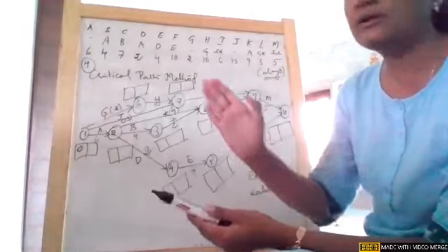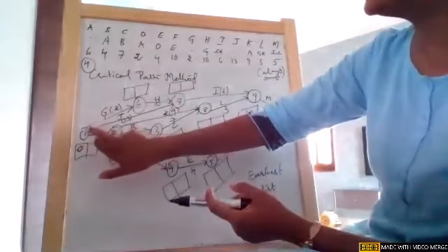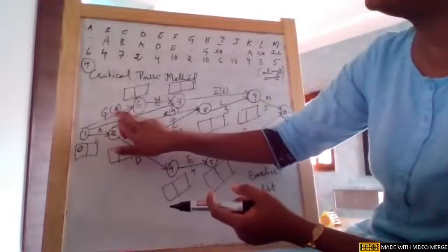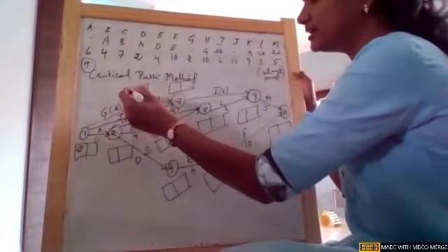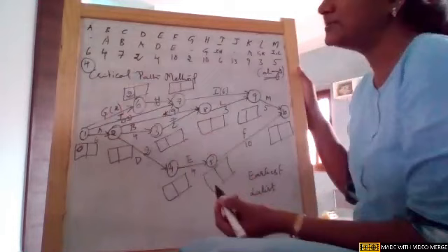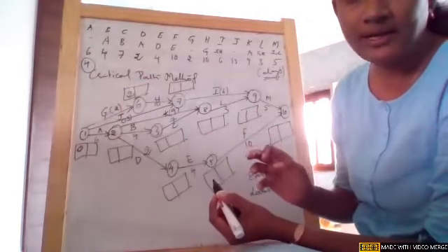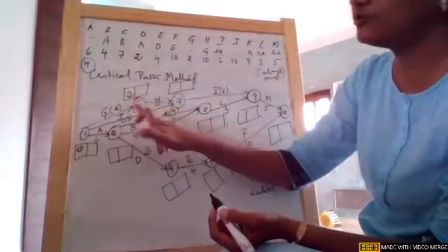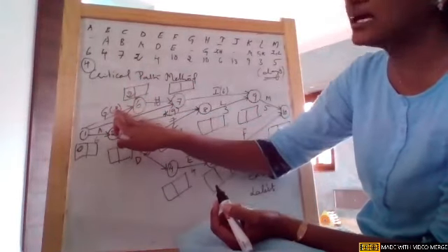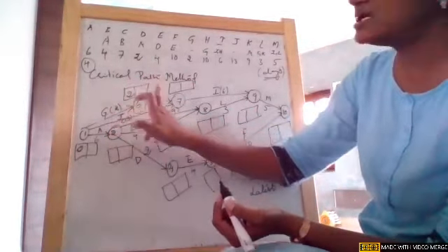If there are multiple arrowheads, there is one more scenario. Now if you see 0, the duration to complete this activity is 2 days. 0 plus 2, so the earliest time is 2. Okay, understood? This arrowhead is giving us a duration of 2 days, so it is 2.